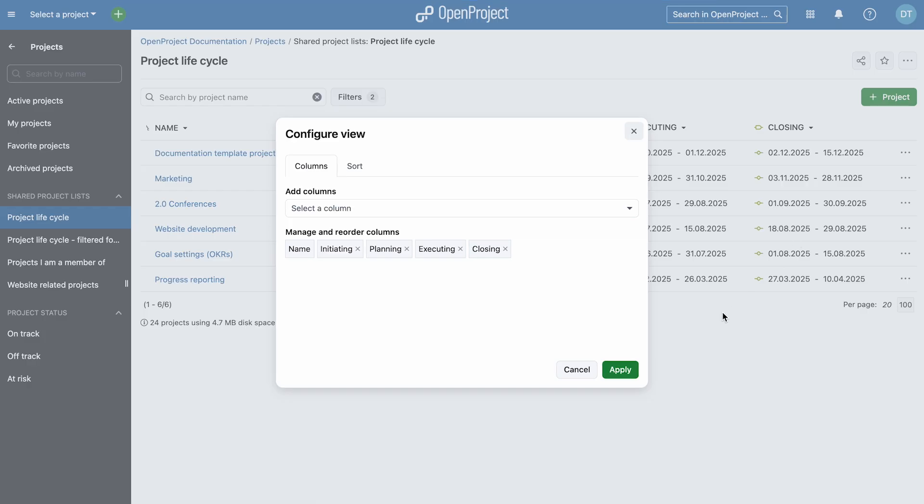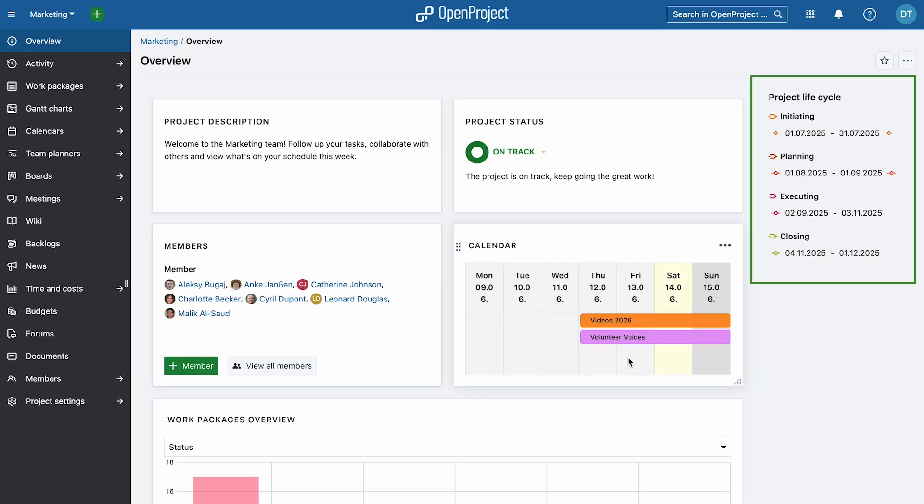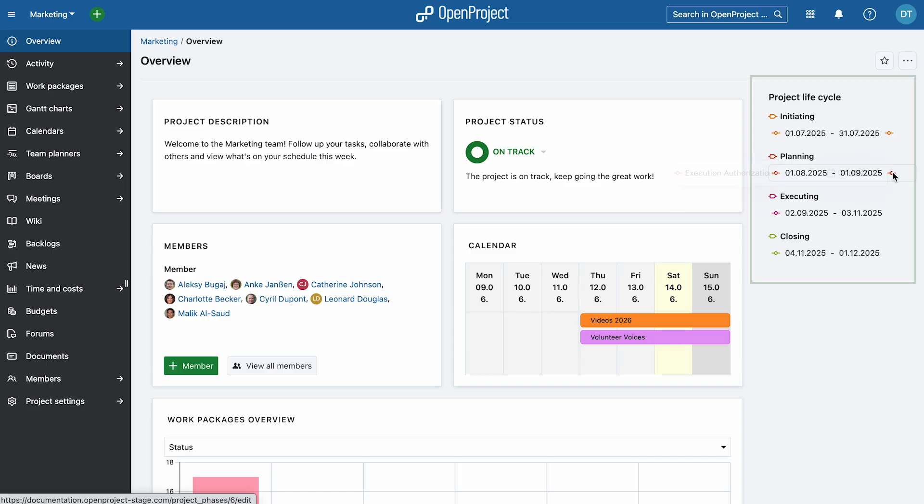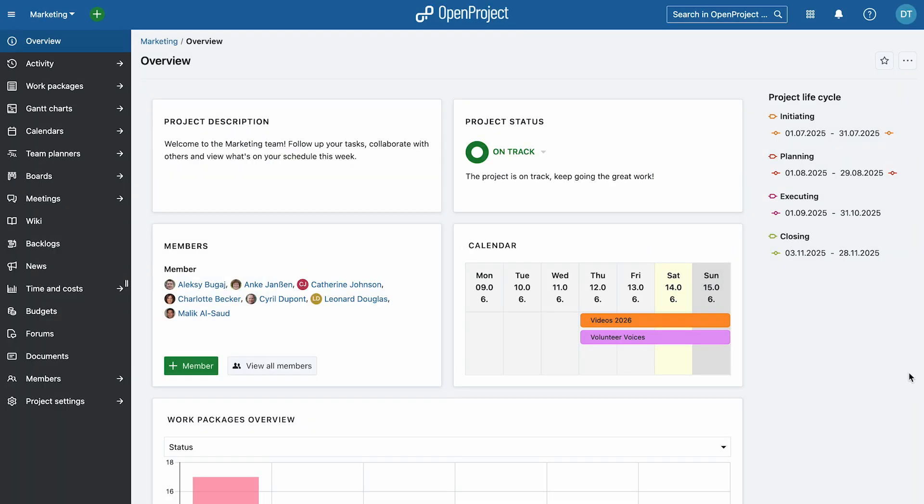In the project list, you can now add columns and apply filters to track which phase each project is in, ideal for portfolio-level planning and reporting. The project lifecycle is also visible directly on the project overview page, where you can enter phase dates, view the current phase, and access scheduling tools at a glance.